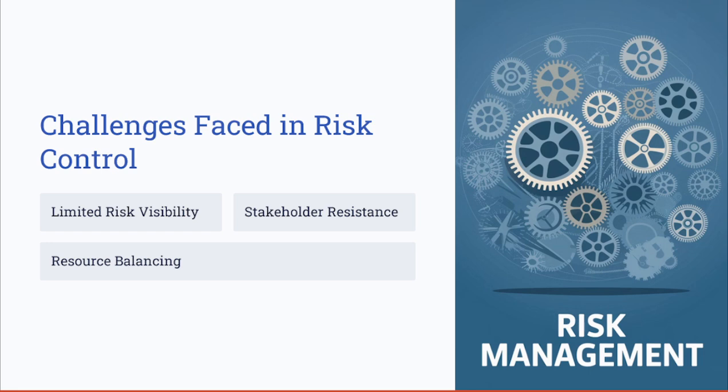Here are some of the challenges faced in risk control and monitoring. The project faced challenges such as limited visibility to potential risks during the initial phases, which delayed some of the mitigation efforts. Also, resistance to change from some of the stakeholders created additional challenges in implementing the risk responses.